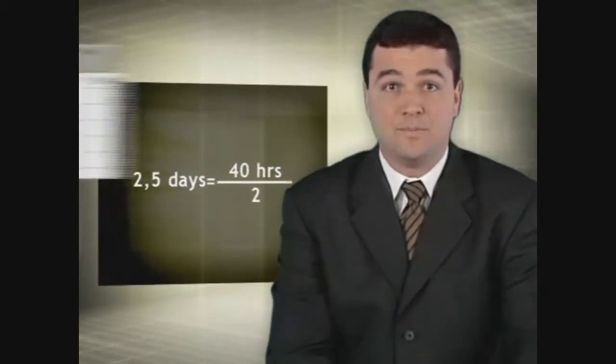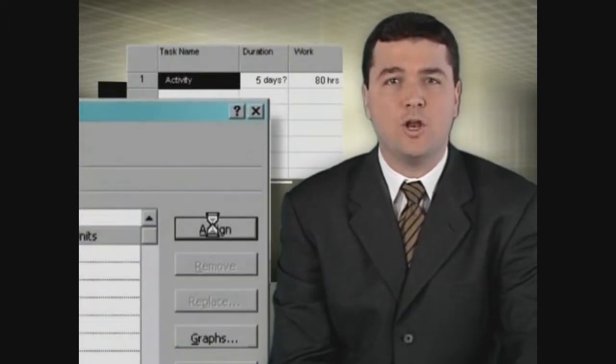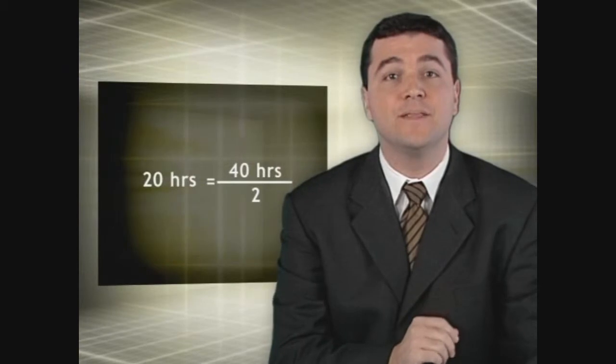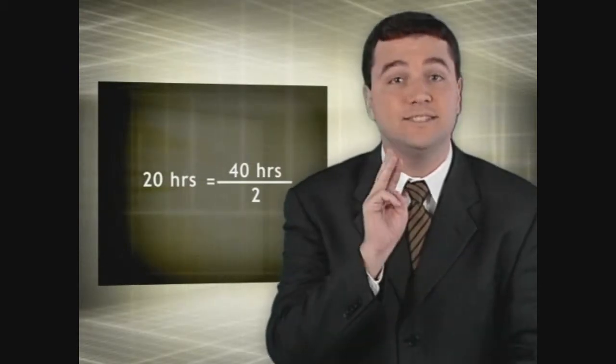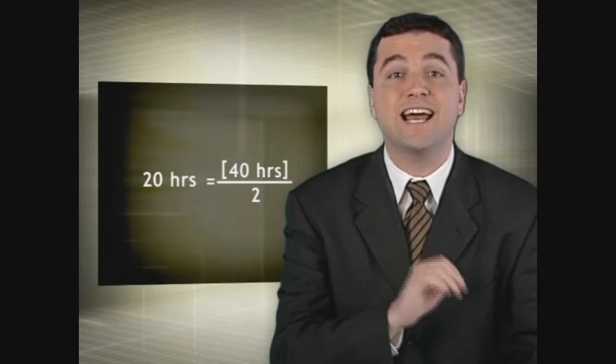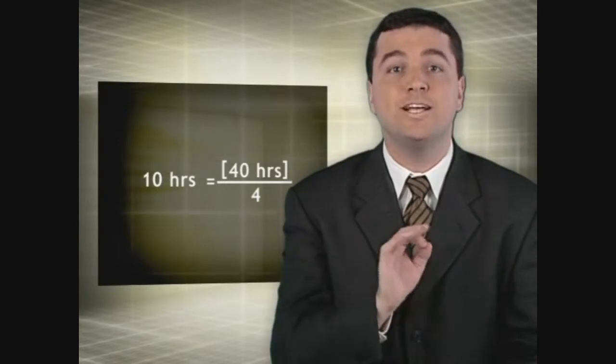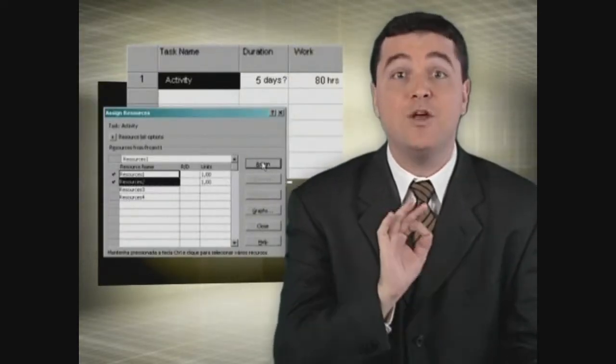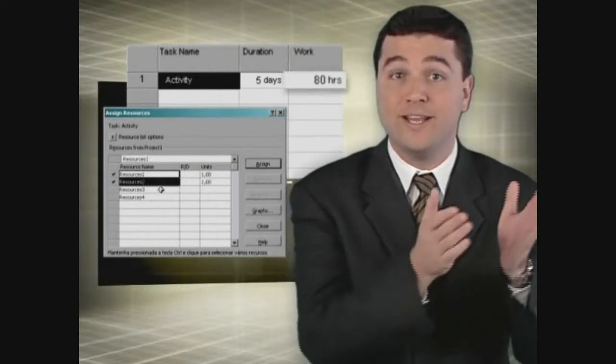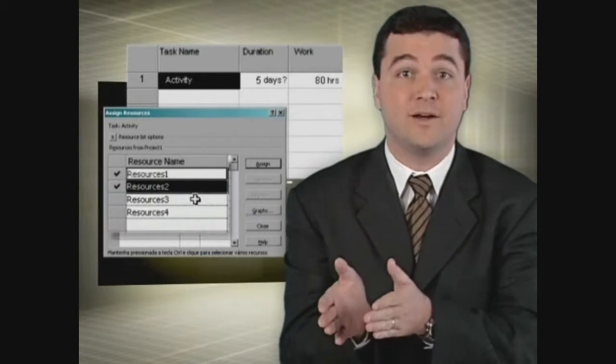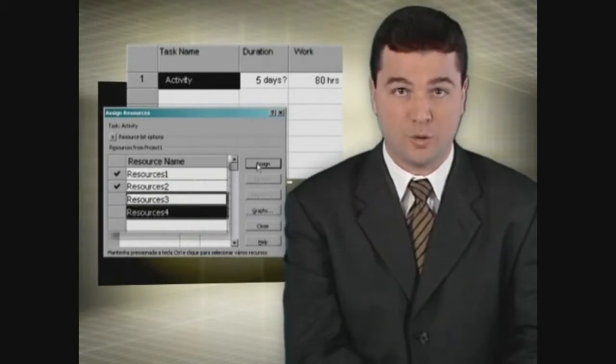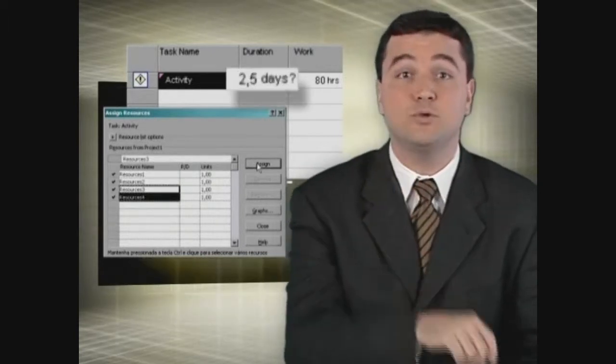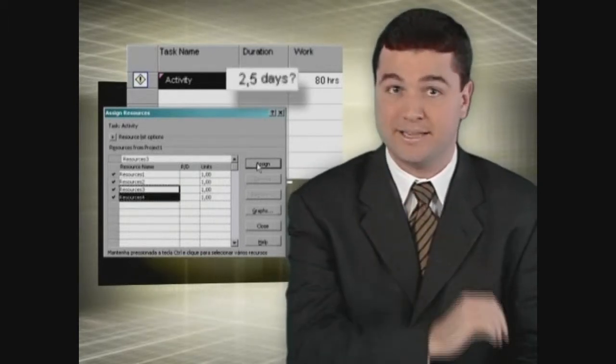This relation is recorded in the first allocation of resources of this activity. That is, you will always maintain one of these three elements fixed while adjusting the other two in order to maintain constant the initial relation. For example, if you set the work of an activity at 80 hours and the initial relation recorded was 80 hours for the two resources by doubling the amount of resources, you will automatically reduce the duration of the activity to one half.